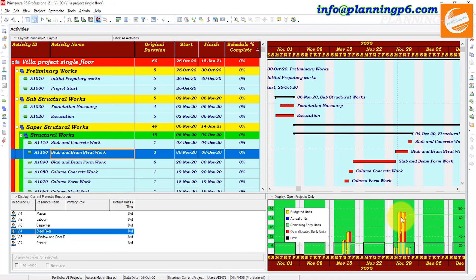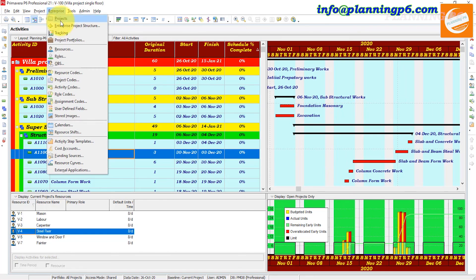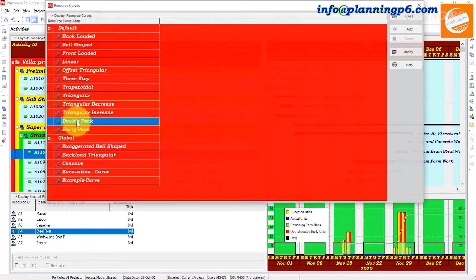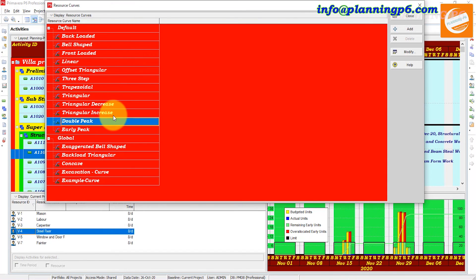The resource curve feature offers several default curves for representing resource loading on an activity. There are 12 default curves defined in Primavera P6 software. It is also possible to create a specific custom resource curve as shown in this tutorial. Please like, share, and comment on our tutorials — thanks for watching.